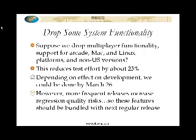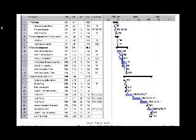Now, obviously, we can't do this unilaterally in testing, but it has to involve the entire project team agreeing, yep, we're trying too much, too little time, we need to shrink the scope of this project. But you also have to keep in mind that this is not without cost either, because of course the features are not being done, and there are people who want those features. And if those features are hastily assembled immediately after the major release and then thrown out as some sort of poorly tested patch, now you've got a whole lot of regression risk that comes with that, right? So really you want to think about, okay, what we're going to do is those features are going to come out in a regularly scheduled release later, ideally, rather than being shot out as one-off patches. Okay, so there's the schedule assumption that we can reduce scope, again, hitting the 26th.